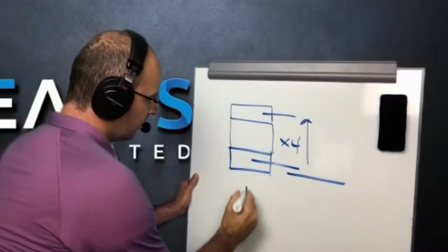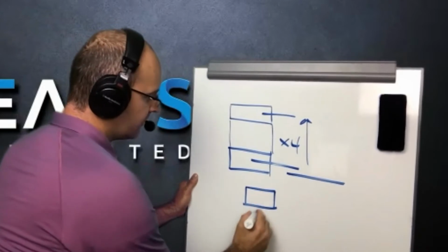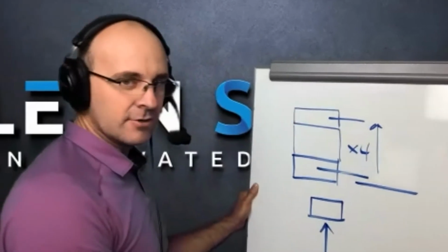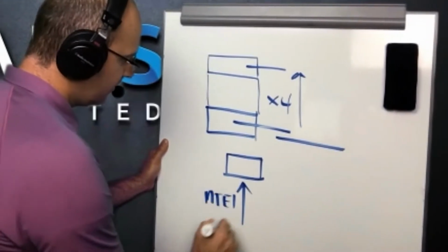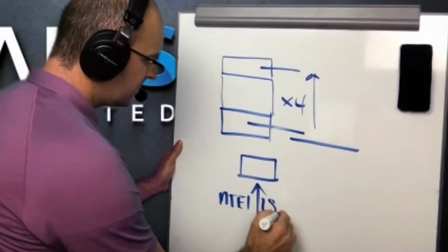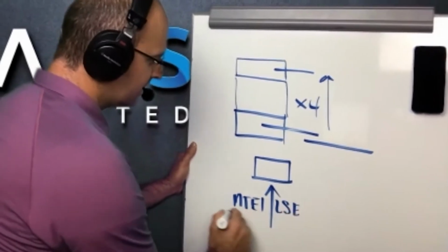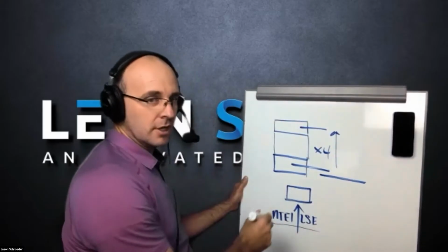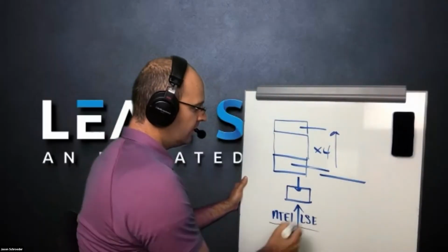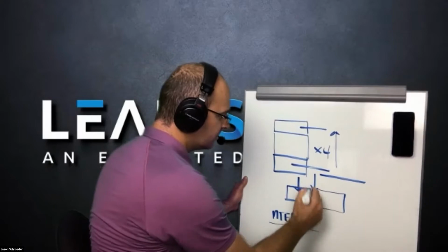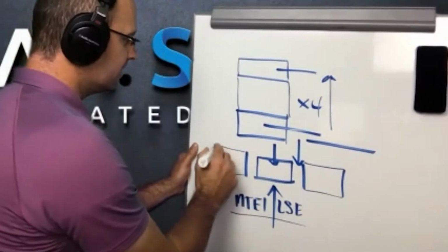If this is the work that we're supposed to be doing and foremen are focusing here, you could leave that crew alone and they'd make production. If they have the materials, the tools, the equipment, the information, the layout, the space, the expectations, you have all of these things here. You could leave your workers alone and they would hit production. We don't need the foreman to focus here in the work. We need the foreman to focus on the in-betweens, the roadblocks, what happens between tasks.